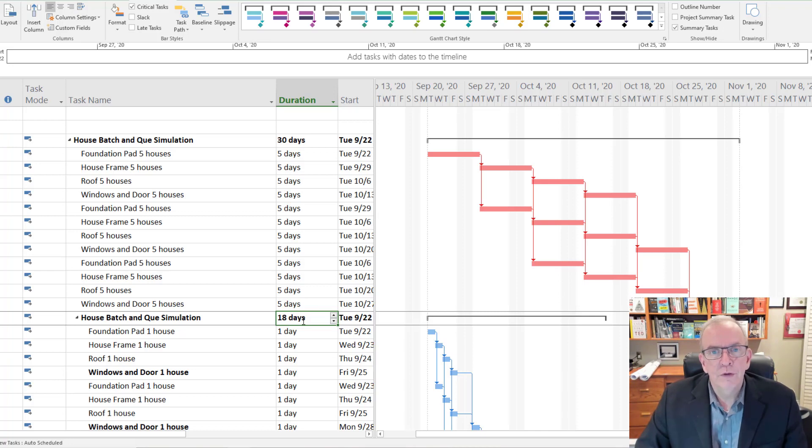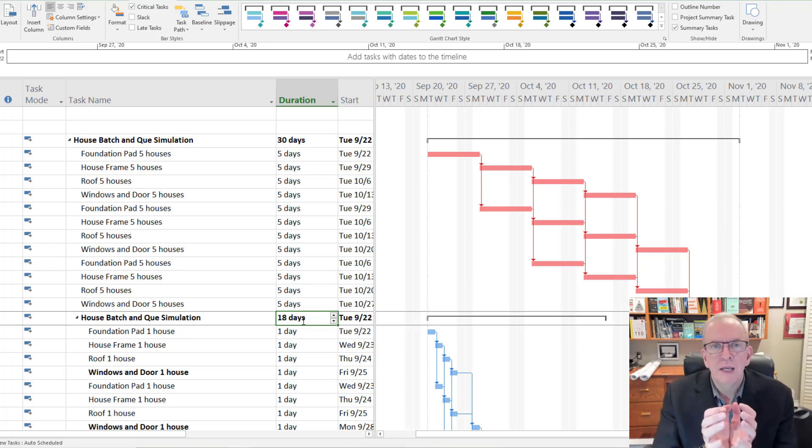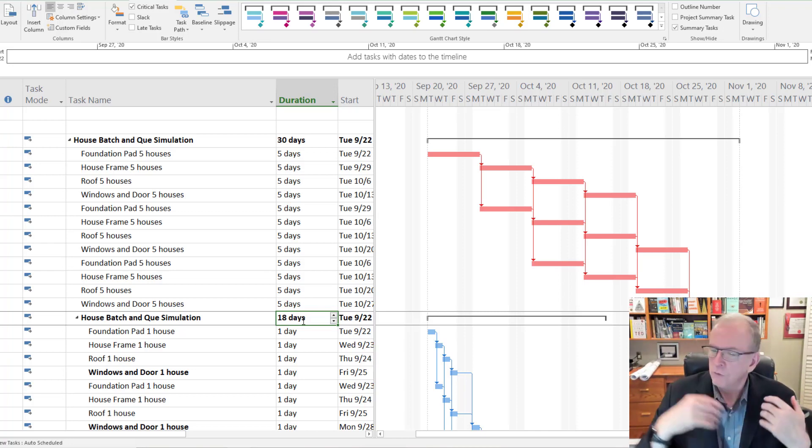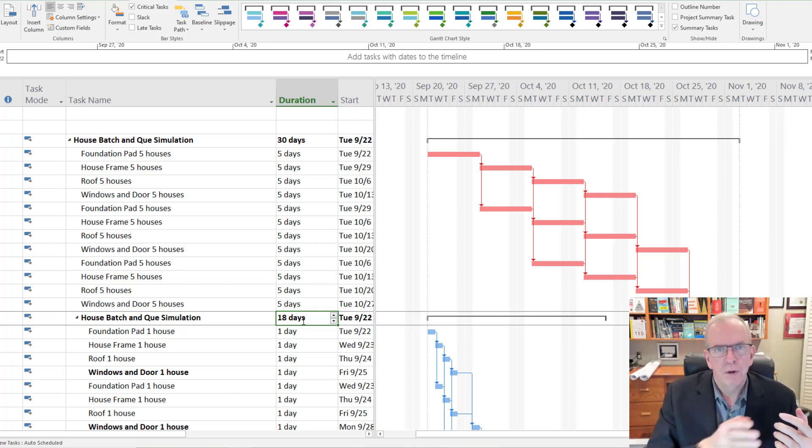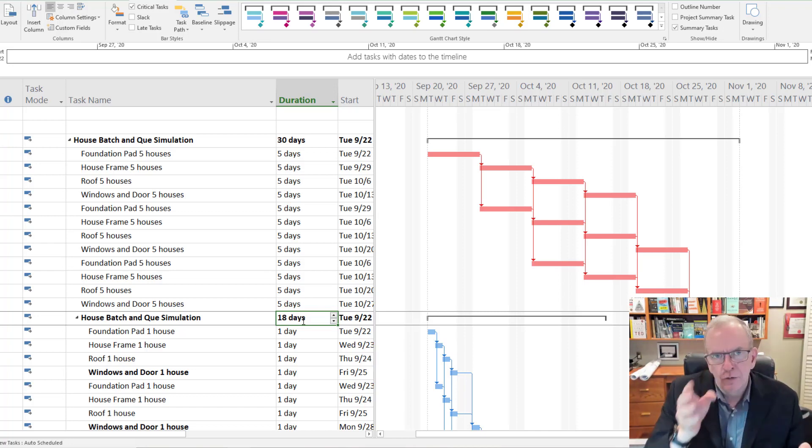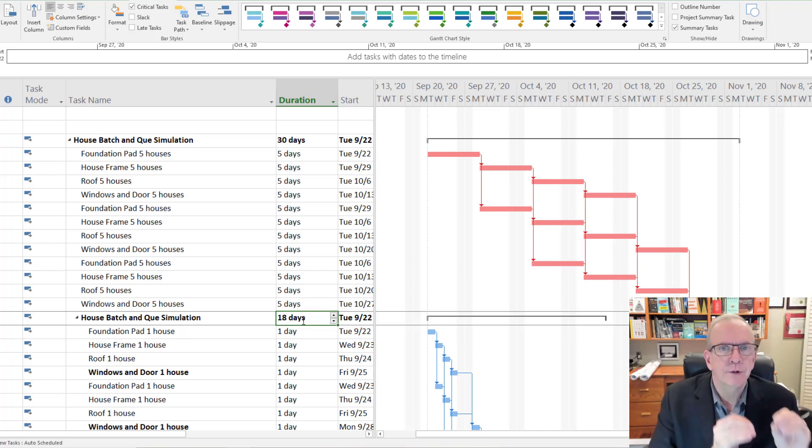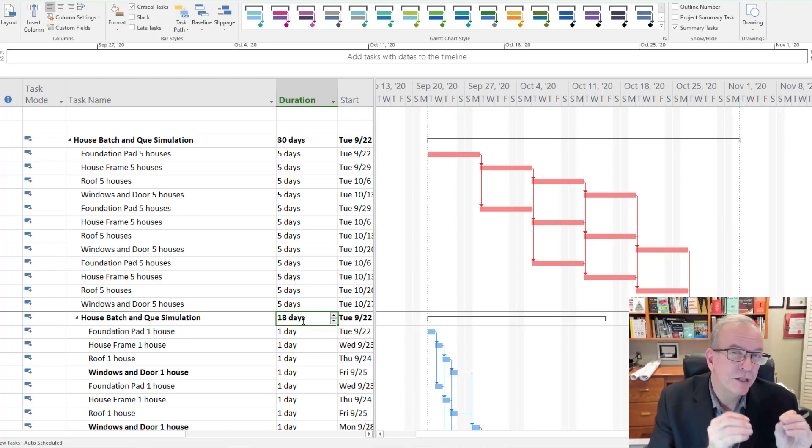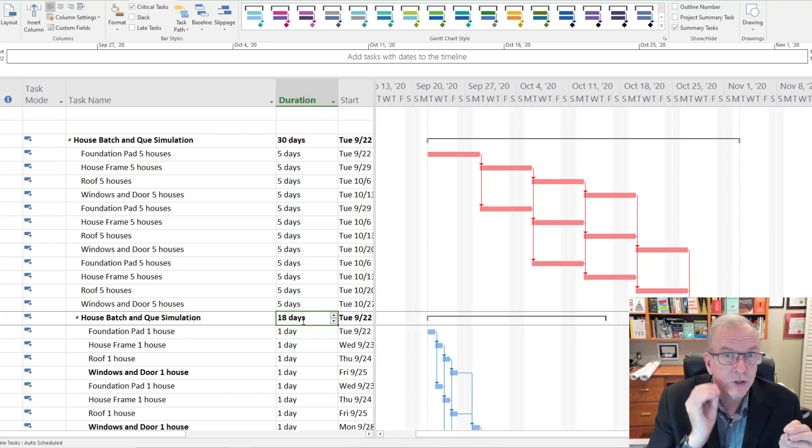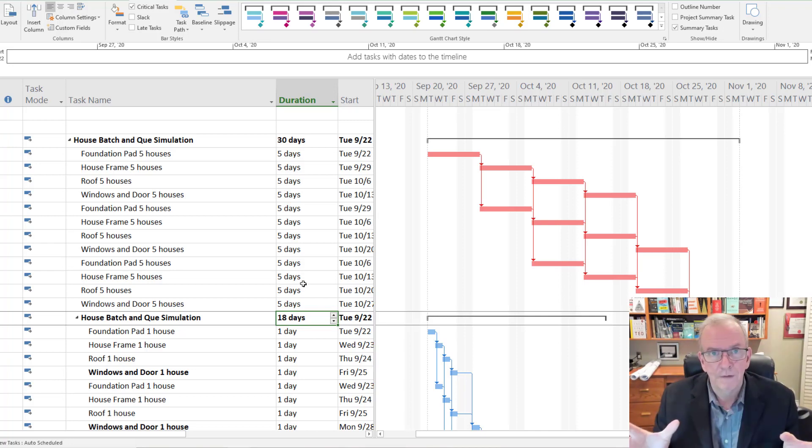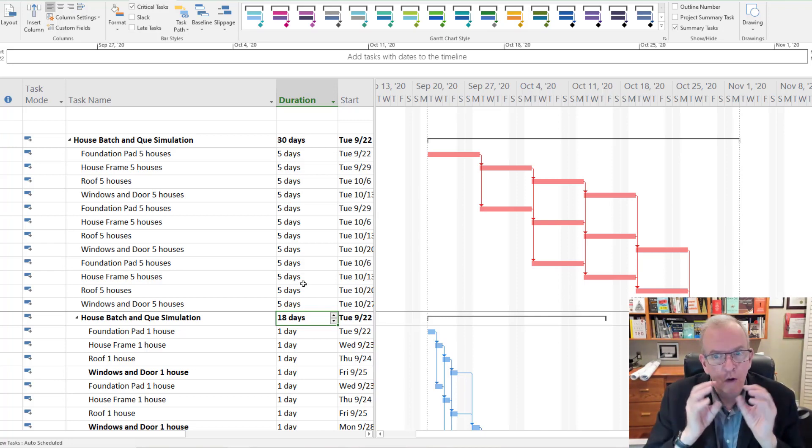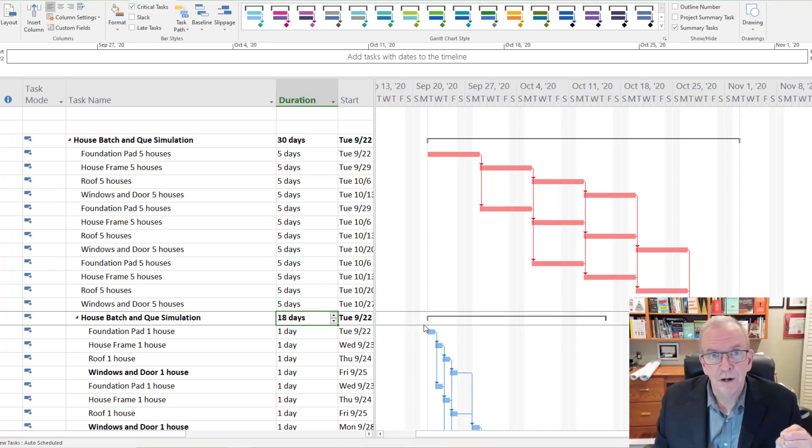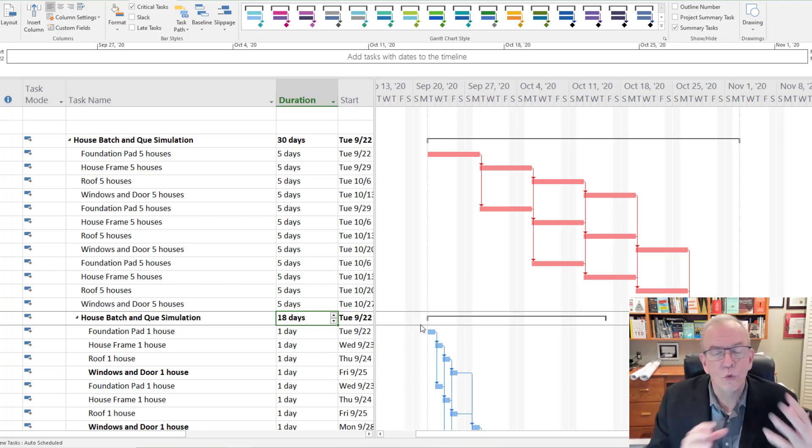Having the tact, and tact is the rhythm, having a smooth rhythm, how long does it take from when we start to when we finish to turn over this process. Improving flow, working in zones, zoning things off, really looking at the timing, putting the right amount of resources that we're not rushing those resources, but we've got them capable of completing that work in that time frame. We're optimizing for the project, we're not optimizing for the individual trade partner. The trade partners are going to benefit, because when we don't get those commitments, it throws big ripple effects into things. Then everybody loses, because everybody's rescheduling, and everybody's then trying to catch up, and it's sort of this whole reactive mess that we run into.